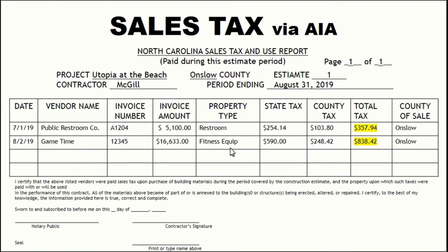If you cannot tell exactly which element that particular charge was applied to, or sometimes you may have a single charge and tax noted with a purchase that applies to several different scope items, in that case, you can remove the tax from your totals on your reimbursement form rather than showing it individually with each scope item on your DER.